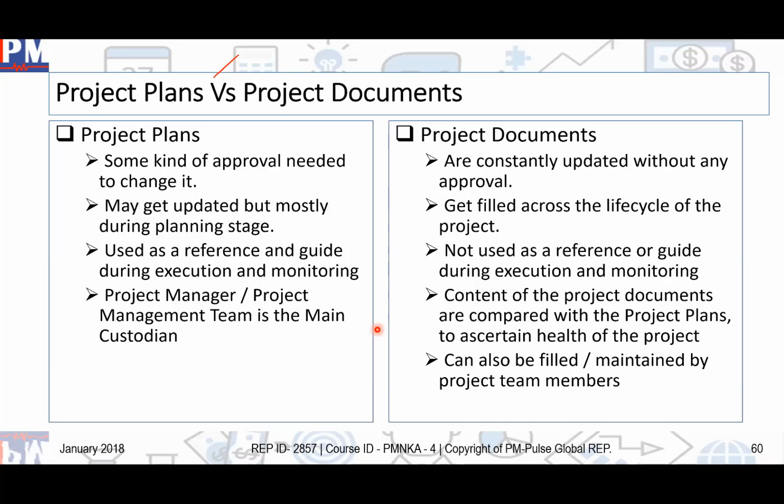So we have to keep on making sure that the project documents, we keep on updating them. There is no requirement for any kind of approval to keep on updating the documents, because that is the whole purpose of project documents. But when it comes to project plans, they need to be approved, right? They have to go through the change request process before you can actually make changes. So very well done, sir. I could not add anything more to it. So that's perfect. Does anybody have a question regarding project plans and project documents?